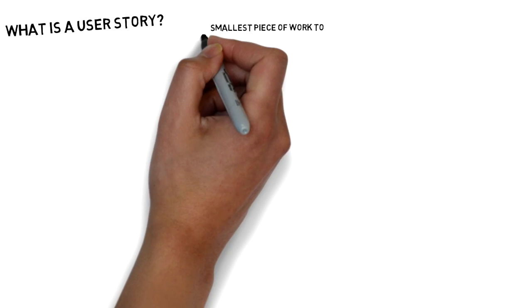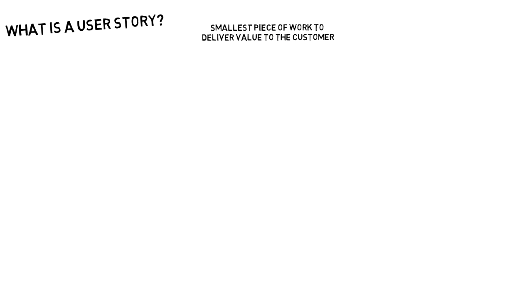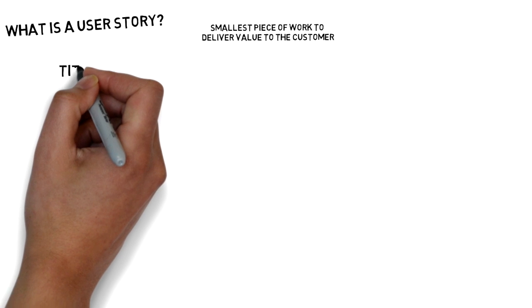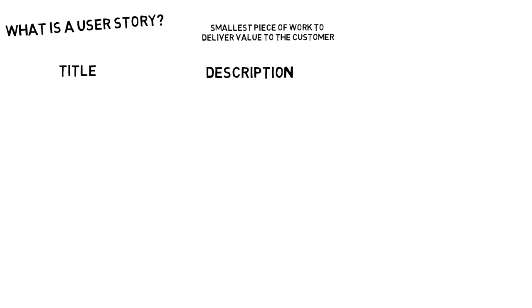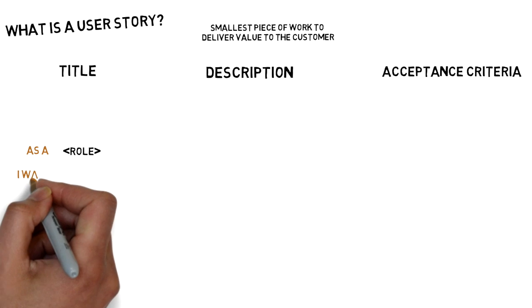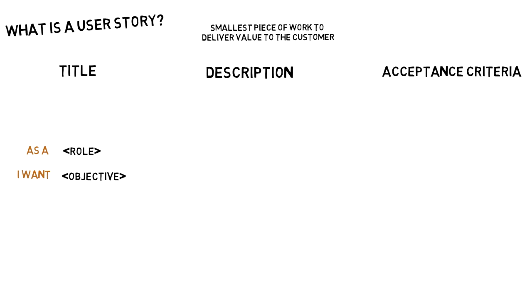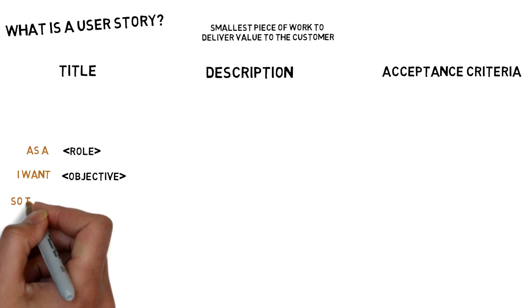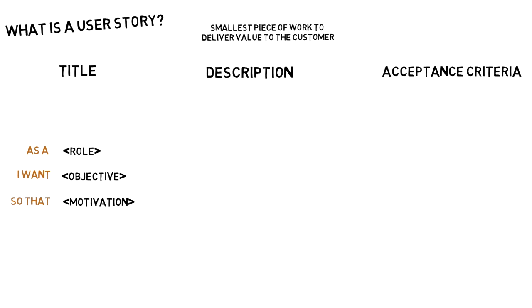A user story is the smallest piece of work that represents some value to an end-user. It contains the following elements: title, description, and acceptance criteria. The title of a user story follows a basic formula: as a role, I want an objective so that I can achieve a motivation.